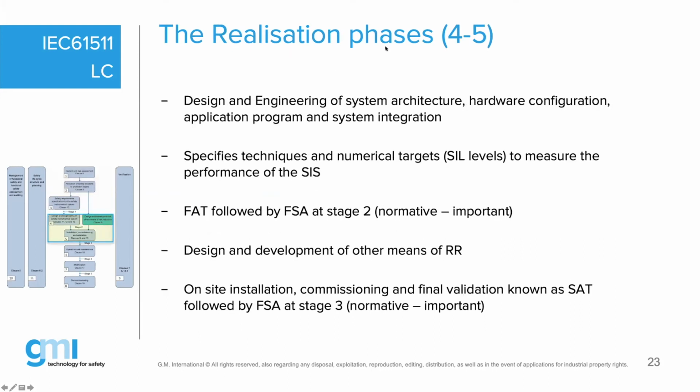Once we are moving in the realization phase, I would say if you start to build systems and stage number 1 has not been carried out, anyone knows that we have done that in the past. That's a very costly exercise. If you start to find out during design or maybe even during the FAT that the system will not reach what the end users need on site, it's a very costly exercise to start to change your design, because maybe you have done some wiring, done some programming, have done some of your assignment, whatever.